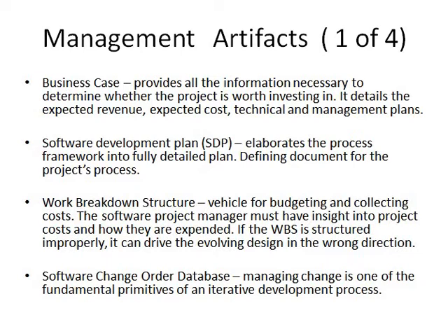Okay, in most of the unsuccessful or somewhat less successful projects, it has been shown that the work breakdown structure, if not implemented properly, can drive your entire design and product structure in a wrong direction. Definitely a functional breakdown in the work breakdown structure, WBS, will result in functional decomposition in the software. So next, going for